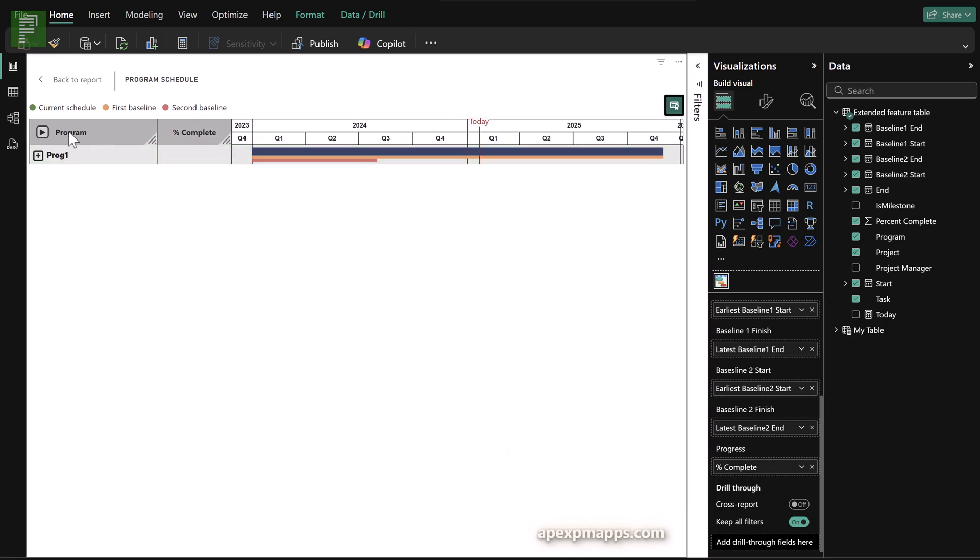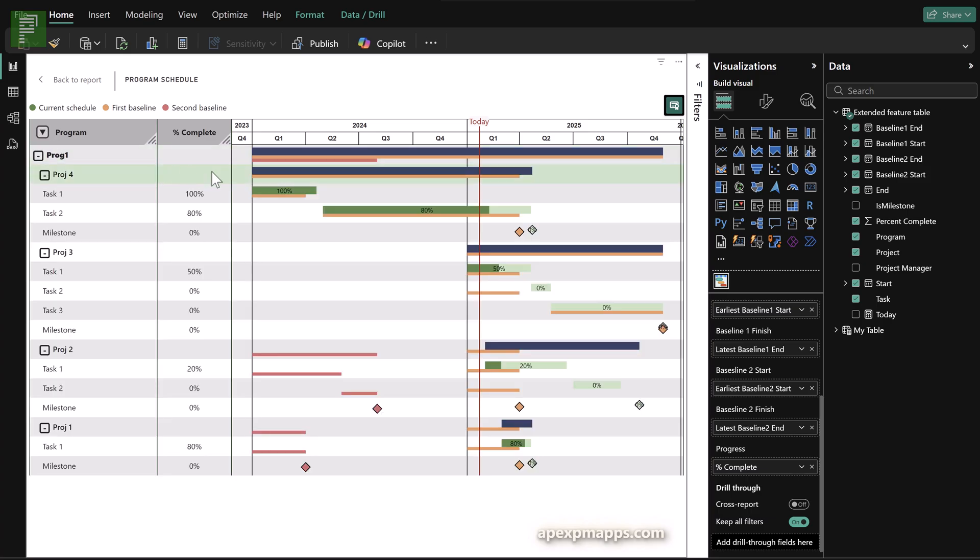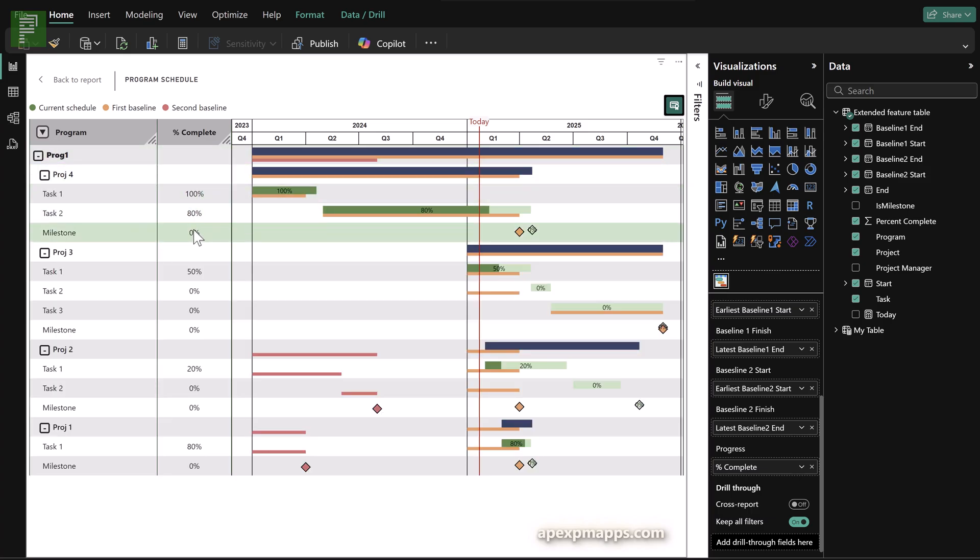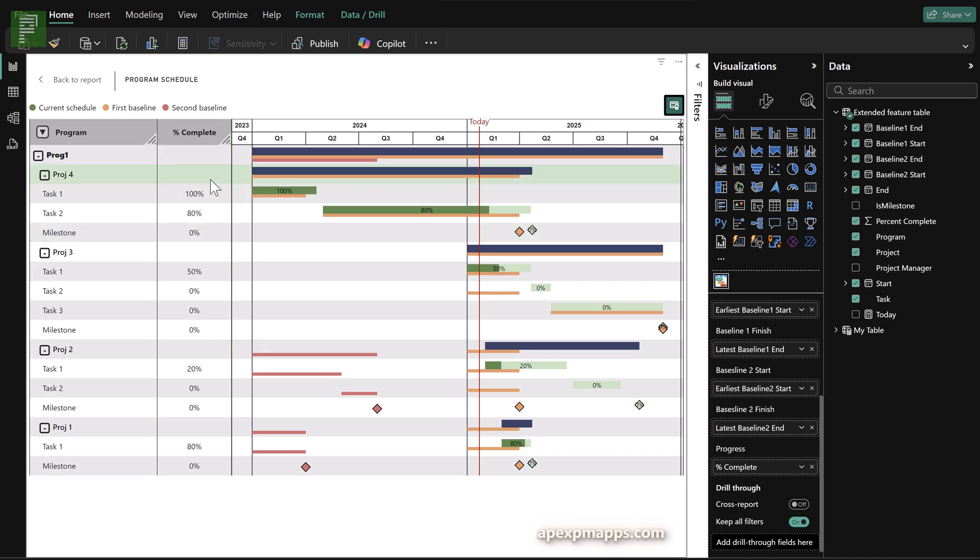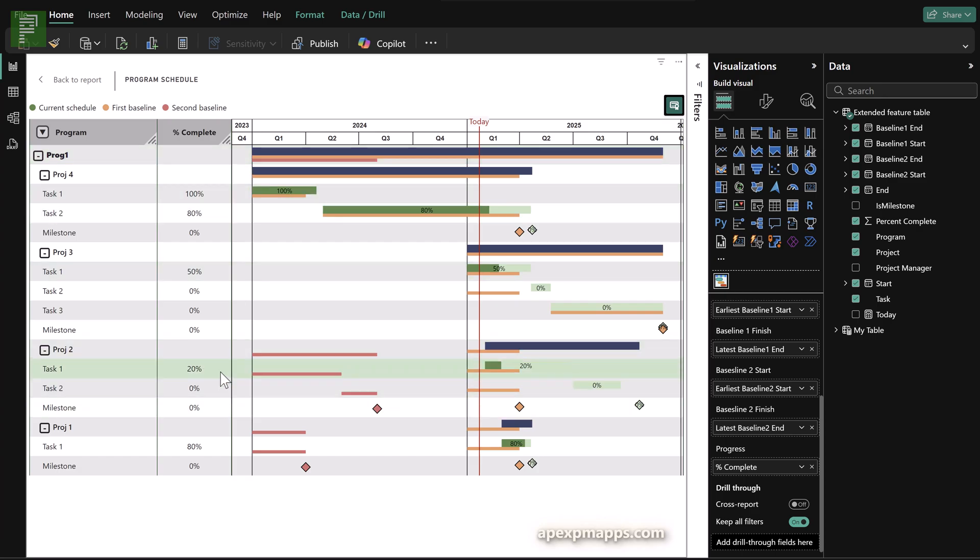So that is the Apex Gantt chart visual. The percent complete will only visualize on the row itself and it doesn't roll up. So if you want to have that rolled up to your program, you'll need to make sure that you have a measure in place so that it also looks at the total project progress as well as the total program progress.